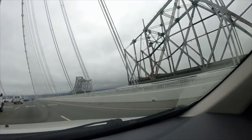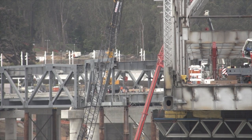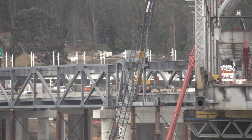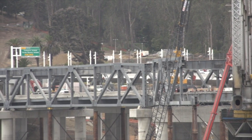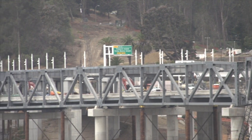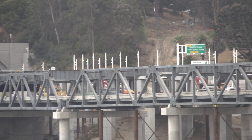Crews take an elevator to the precipice. Once debris is hoisted down, CBC-Silverado, a joint venture, will have the S-curve down in 2015. We have to have enough of the S-curve gone so we can also build the new eastbound on-ramp — and remember that the bike path is cantilevered off that new eastbound on-ramp. So that whole thing, which is essentially another new bridge attaching to the larger new bridge, has to be constructed before bikes can get to the island.